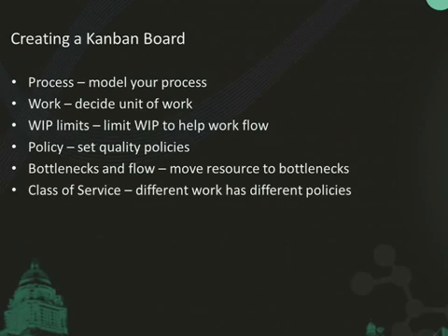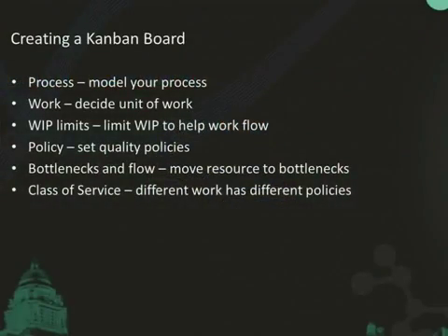And then we define different types of work, or different types of policies for different types of work. That was the expedite and the intangible. And we say things like, we'll spend 10% of our time doing intangibles. We'll say things like, if an expedite request comes in, so, a sales guy who says if you can get this to a customer next Friday, we'll get $1 million or £1 million. You set up a policy for how you're going to deal with that. You might stop everyone working and then get them to work on that expedite.